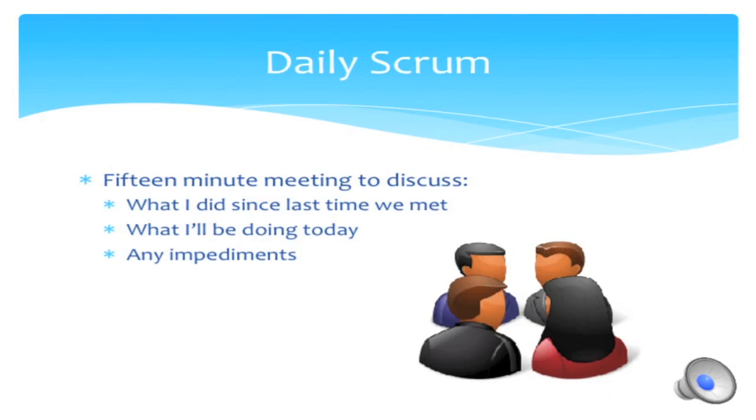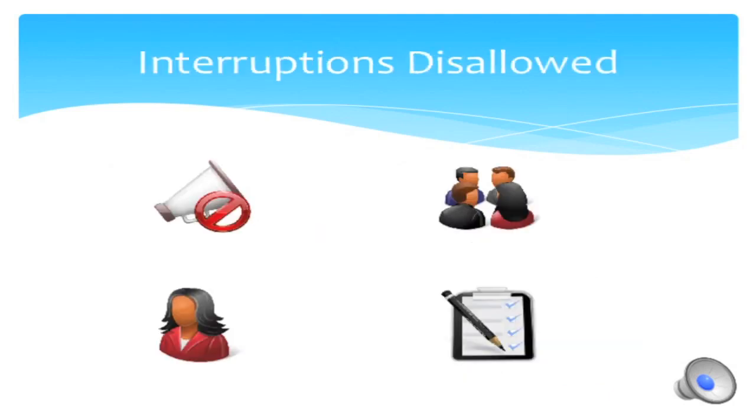During a sprint, no one is allowed to interrupt the work of the development team. This is because context switching is harmful to efficiency. If someone decides that they need the team to work on something new, the product owner intervenes, adds the requested item to the product backlog, and orders it along with all the other items on the backlog. If it really is important, it will go straight to the top of the list and be pulled into the next sprint, so the longest anyone will have to wait is the duration of the sprint.